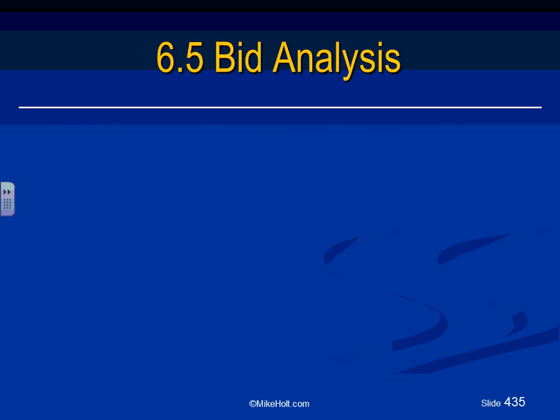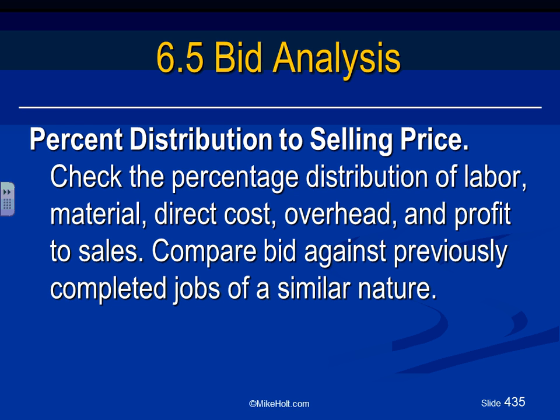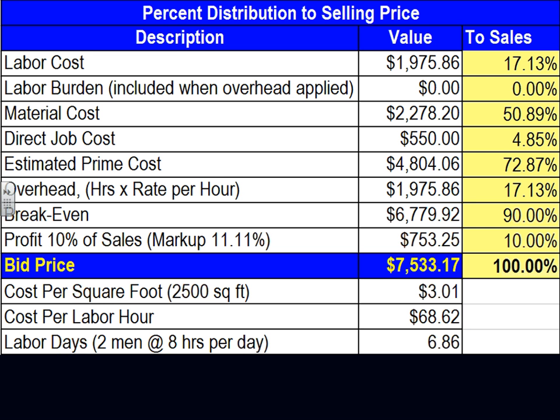Any comments, guys? Any questions about these flags? These flags? Percentage distribution cell. This is very easy. They take the percentage. They give you what's the percentage of labor from the overall cost, your direct job cost, overhead, profit, sales, all these percentage-wise, and compare them with the data.